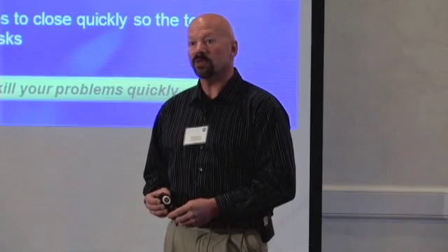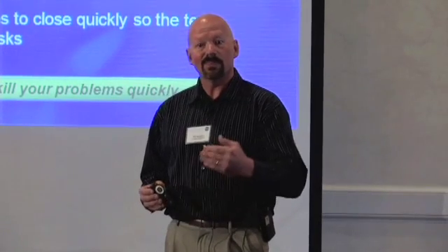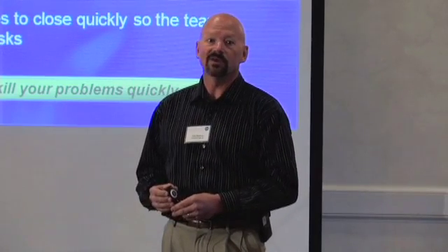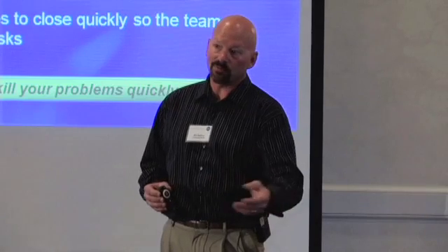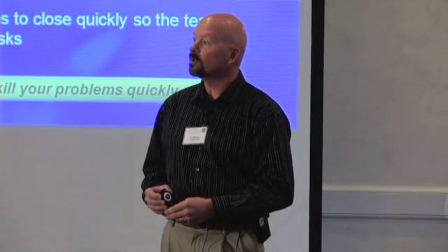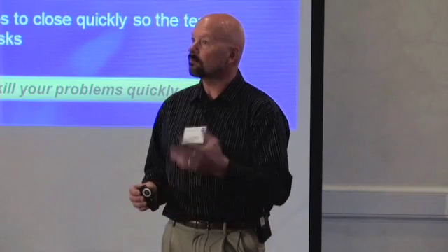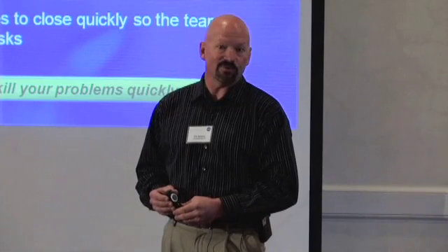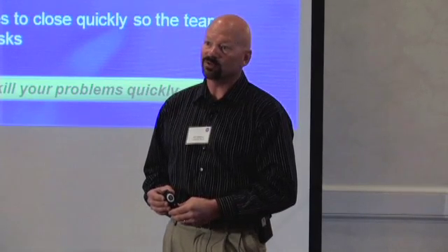Usually you don't give them what they ask for. You give them enough to help them over their problem, and then if the problem continues to get more difficult, then they get more resources. But I guess one of the lessons that I learned going through Phoenix was you very rarely give somebody what they're asking for, but you always give them what they need.